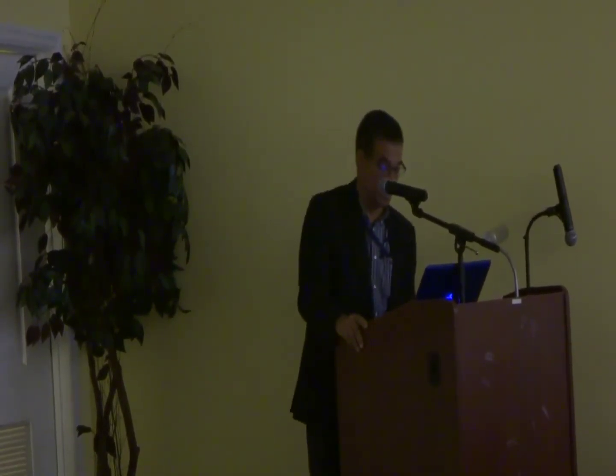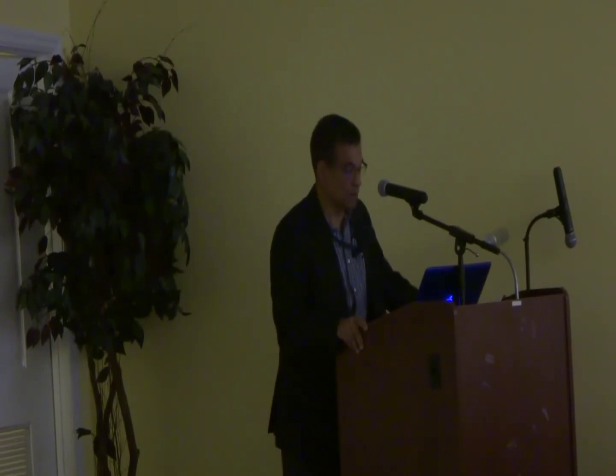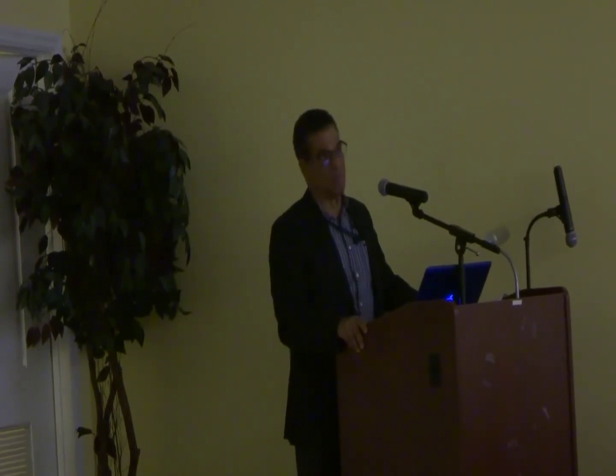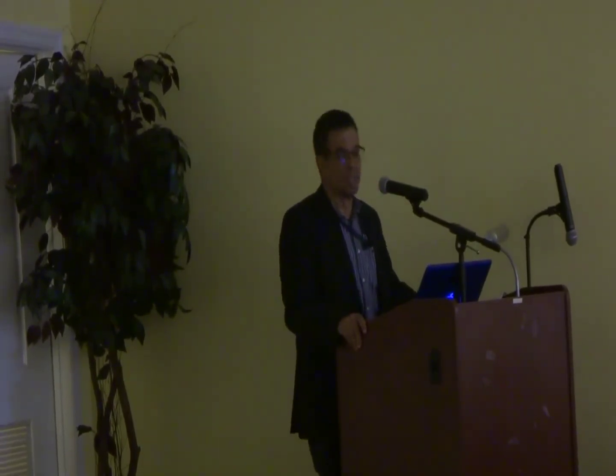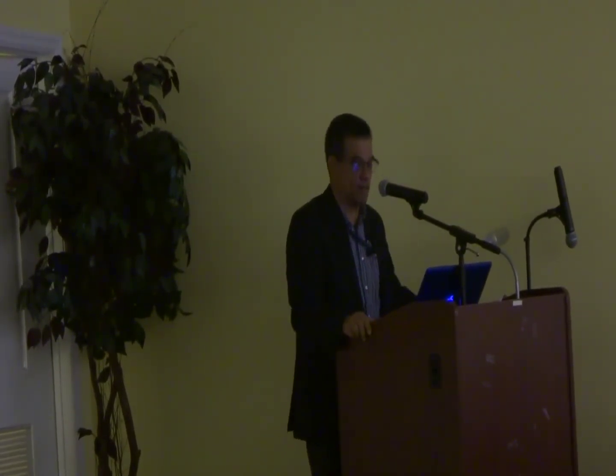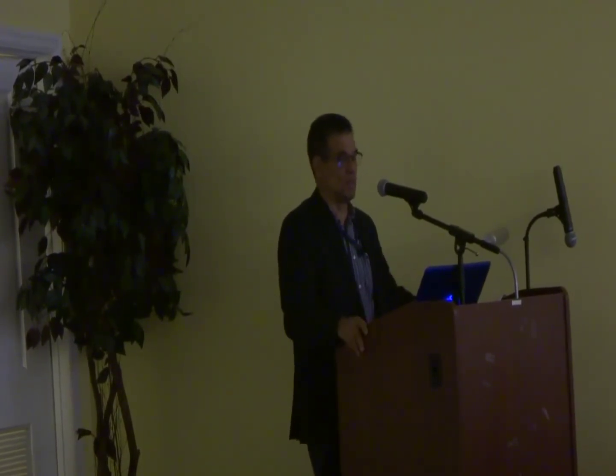You can see here, the more reimbursable you get, the risk changes. So when you have a lump sum spec and drawings and bills of quantities, the contractor takes all the risk. The employer takes very little. Policy changes? Well, that's a separate issue. Correct. That assumes that there are no changes.